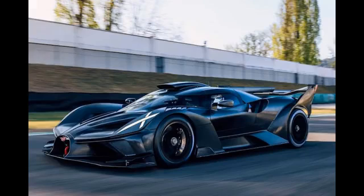Maintaining Larry Jeffers Race Cars project budget: a nitty-gritty scenario approach. Here's a deeper dive into how Larry Jeffers Race Cars can manage their project budget using specific scenarios with measurable details. Scenario 1, Engine Upgrade for Car Number 22, Stepping Up Performance. Planned budget, $10,000: parts, $8,000; labor, $2,000. Milestone, completion of engine installation and dyno testing for performance verification.